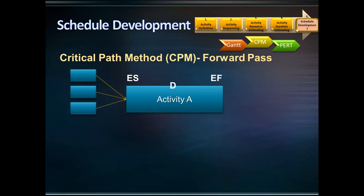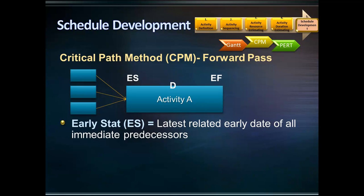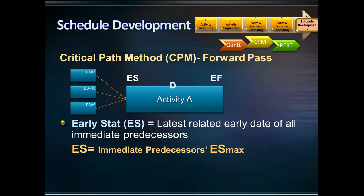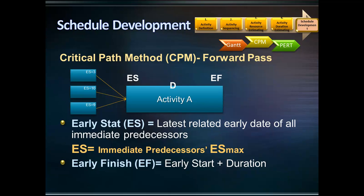As seen in the forward pass, the early start of an activity is the latest related early date of all its immediate predecessors — in other words, the maximum early start of its predecessors. For instance, if the early start of activity A's predecessors are 3, 10, and 9 days, the early start of activity A will be 10 days. The early finish of an activity is its early start plus the duration. This is how early start and early finish dates are calculated in the forward pass.